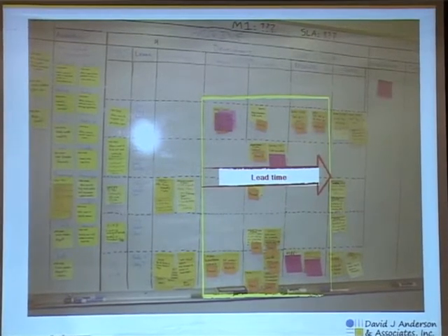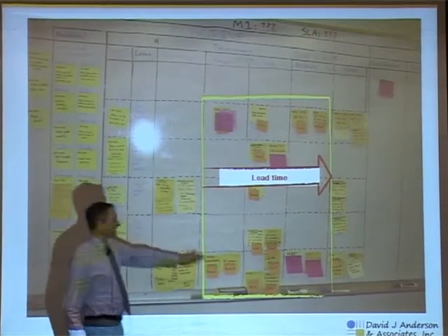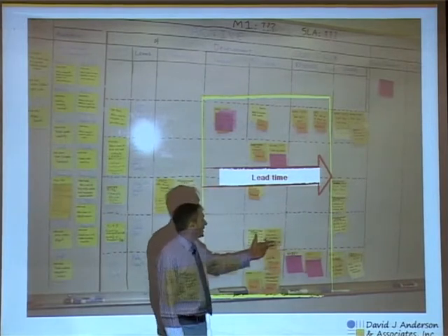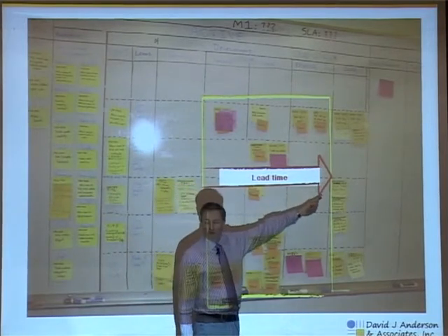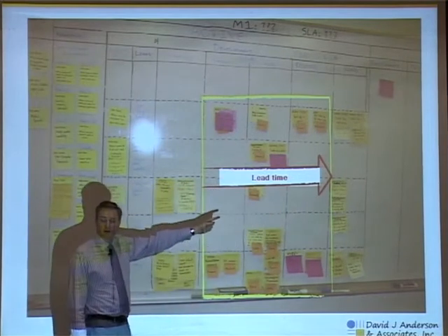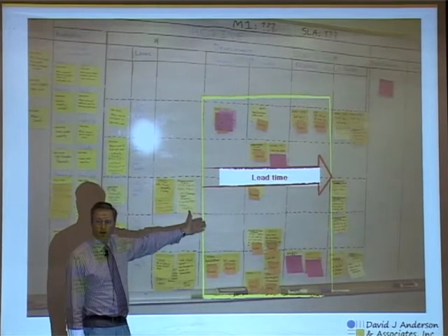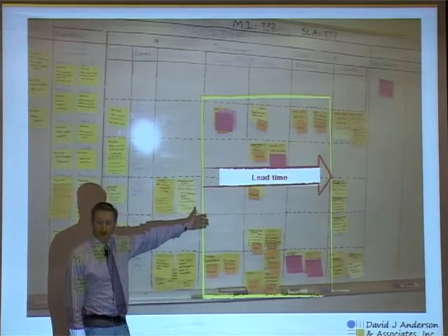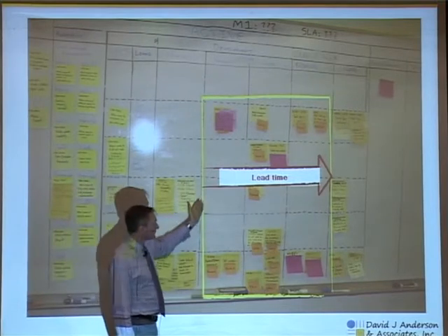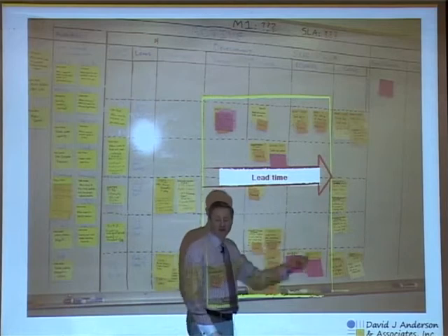This middle section, these columns are design, coding, and testing for the user stories. And the lead time here should be a mean of 2 days if we're going to hit the project plan. This was an $11 million project with 55 people on it over 16 months. Non-trivial activity, and it's all being managed on the basis of, can we move these tickets across in 2 days